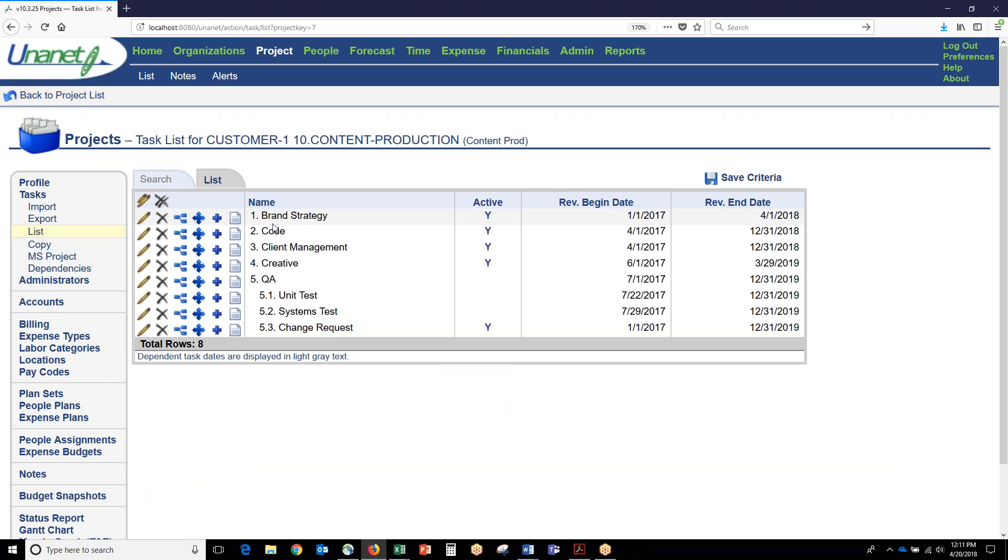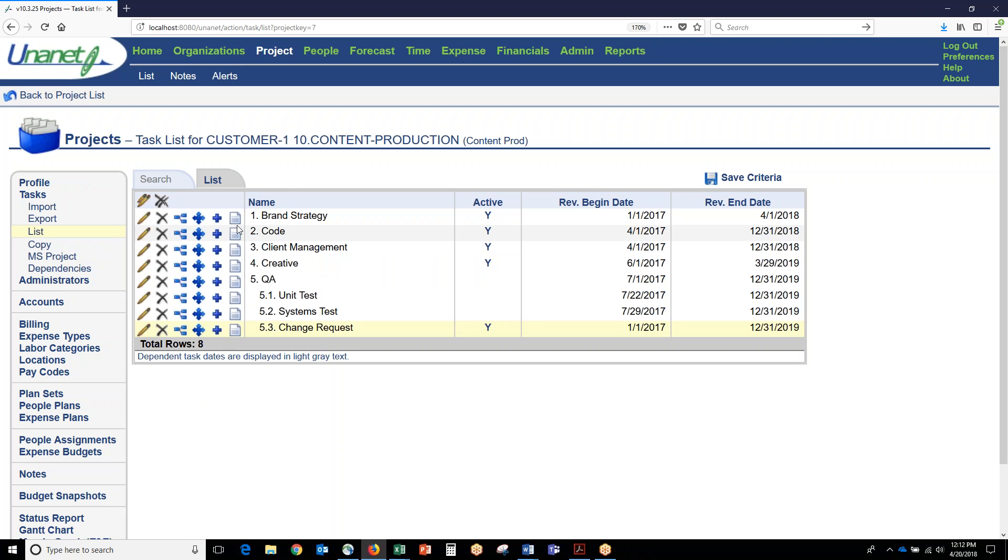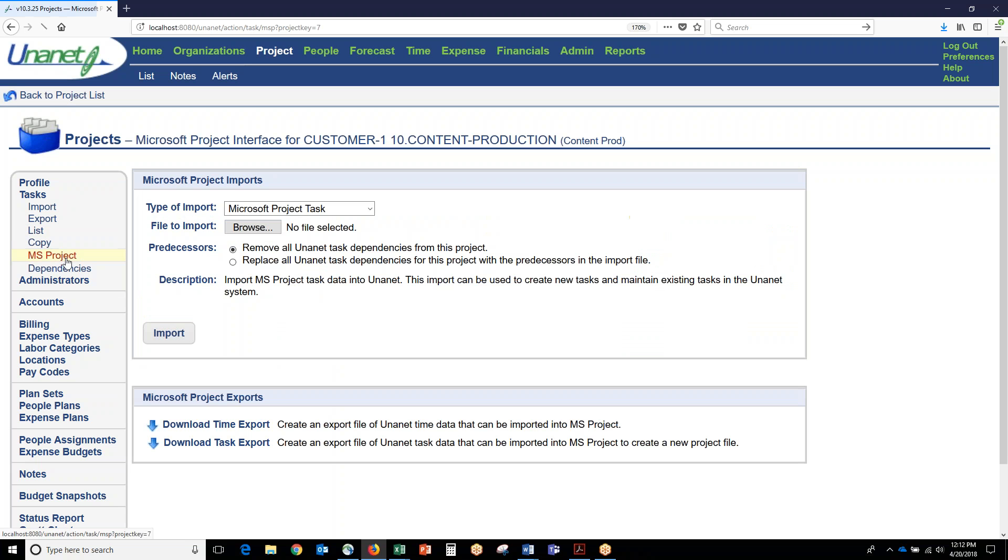These are all the fields around a project. This is where you have the tasks underneath the project, and you can have any number and level of tasks and subtasks. There's basically four different ways you can get the tasks into UNINET. You can either use the UNINET web interface and just add the tasks directly through the web interface. You can copy, so if you have standard tasks or standard work breakdown structures you do across all projects, there's a copy feature that will allow you to copy a template into UNINET.